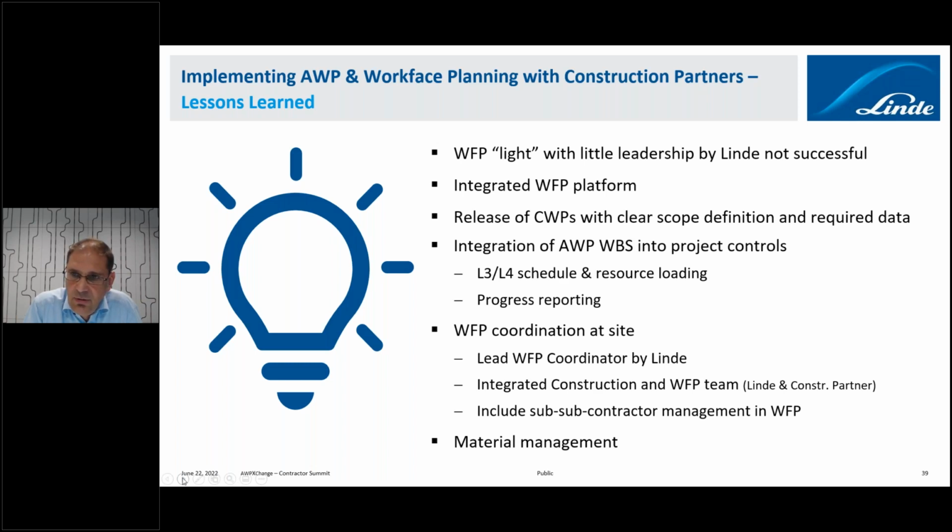And we had to realize that this was not very successful. There was a mismatch between the construction and the workplace planning organization, and also the involvement of subcontractors was kind of turning upside down the execution sequence. So this is something which we have definitely changed.